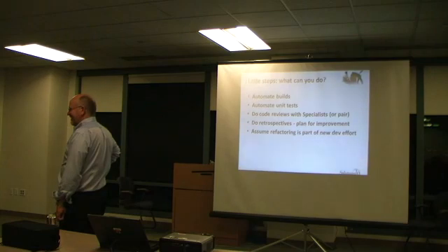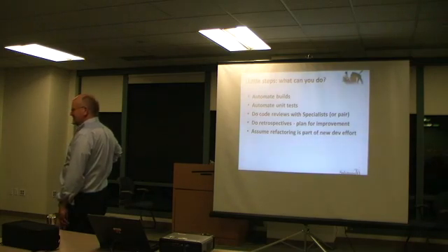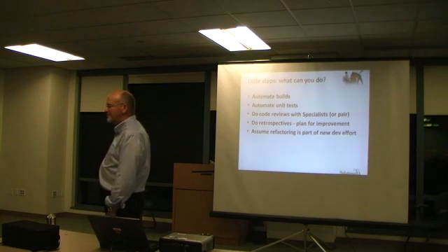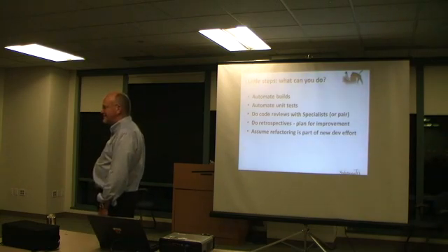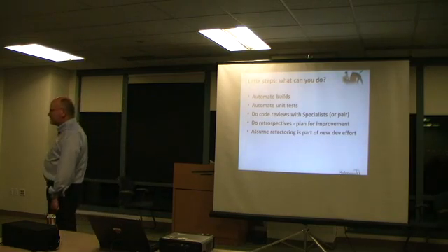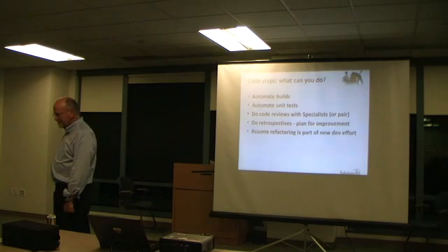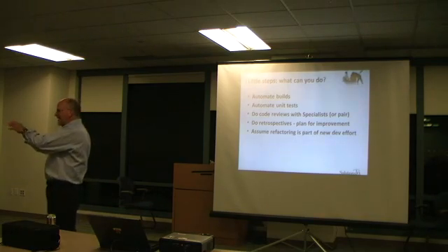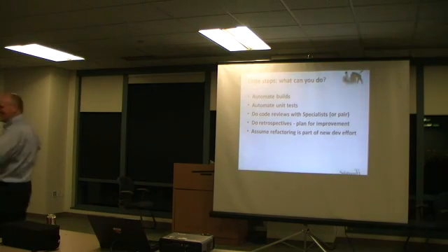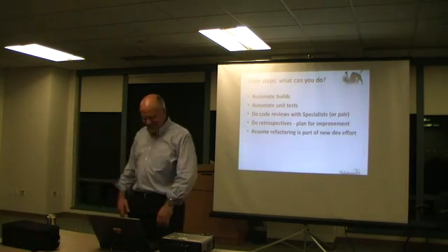The actual recommendation is that every 5th sprint is completely dedicated to infrastructure and refactoring. They call it a hardening sprint. So the team works 4 sprints on the new features. The 5th one is about infrastructure, automated testing, refactoring, and redesign, and then the 6th one is a release-only sprint. Which is different, because I think when they first wrote the book, they had no clue that people could really release every 2 weeks. It was beyond their ken that somebody would actually do that.